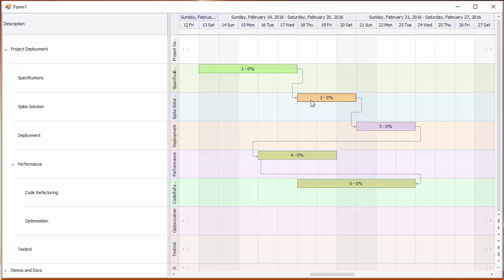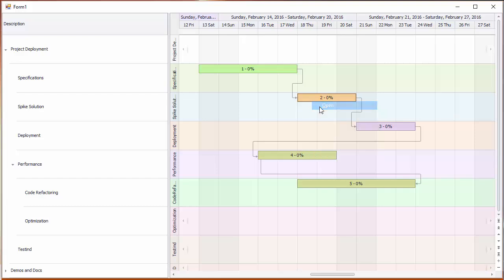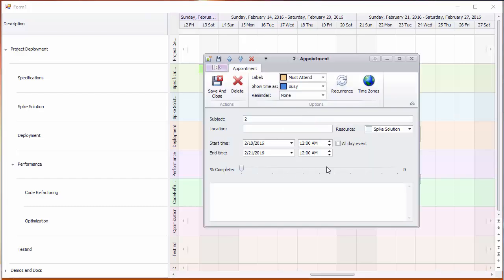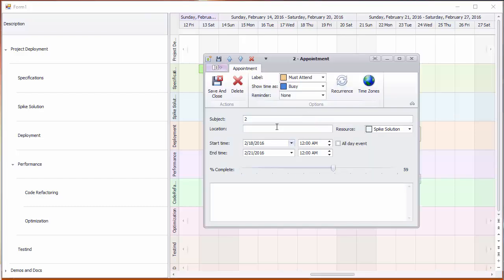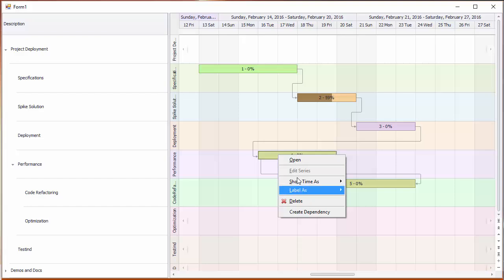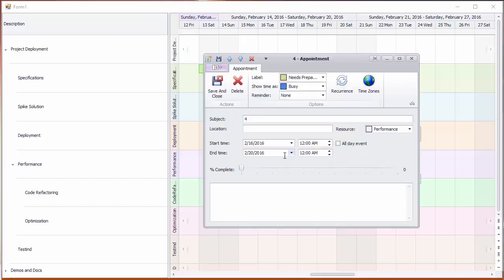You can open the appointment editor for a task and edit its percentage completion. The task is updated with shading to show the percentage complete.